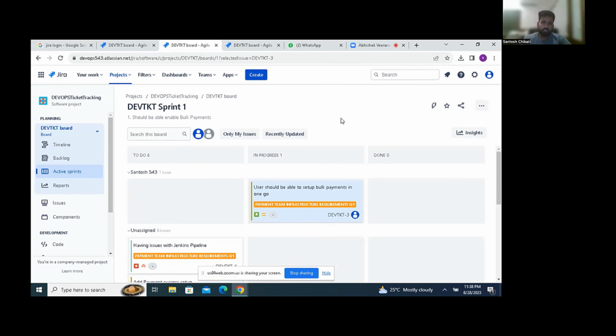Why are these user stories not to-do items? That's the reason I was talking about a very important meeting called the daily stand-up. In this daily stand-up, the three main points are: what you have done yesterday, what you are going to do today, and any blockers. These are the key things that any developer in this team should be talking about.